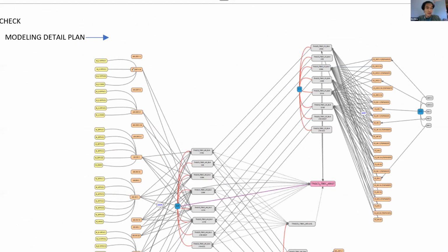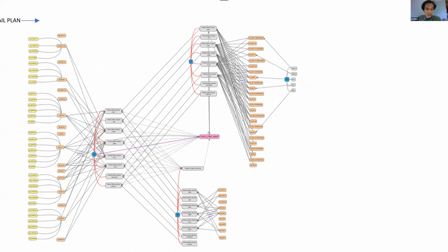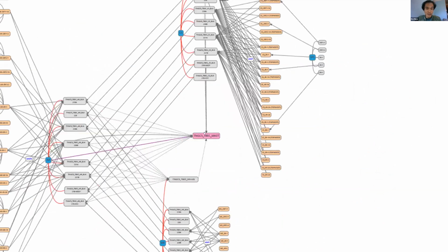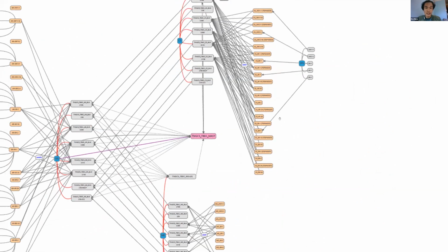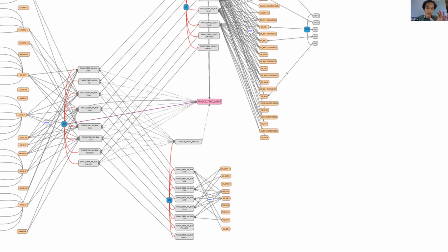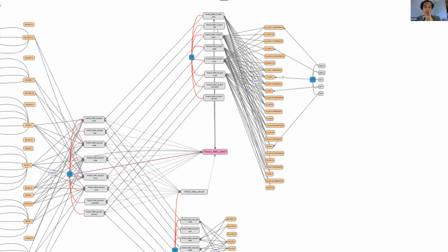We can form a unit. Then we will include those units built up to the block. So those are individual Revit files linking to each other. Then finally they become one master file, where you can see all the structure model, Archi model, MEP model, and PVC or our precaster models.